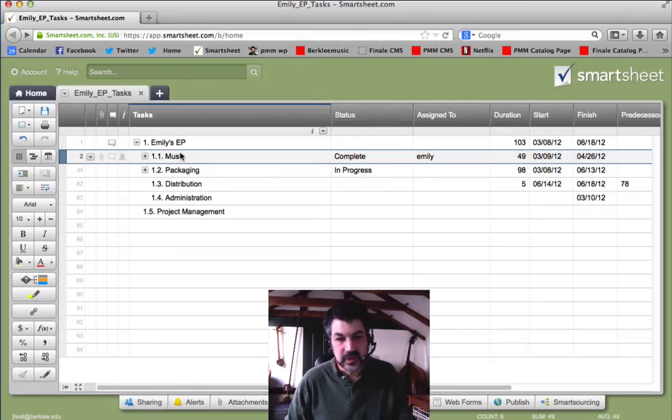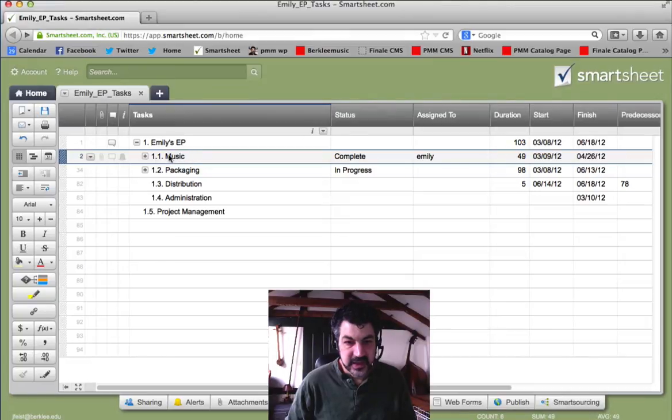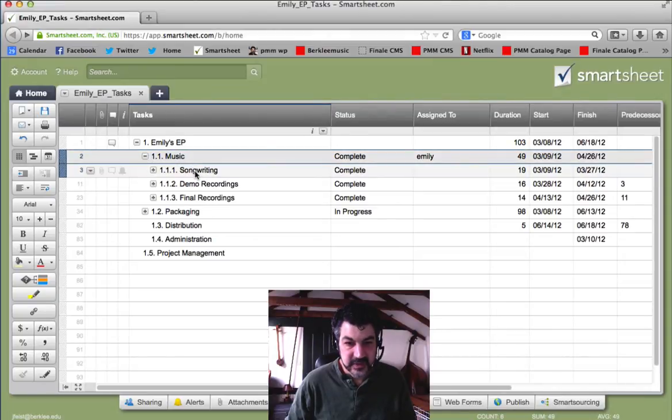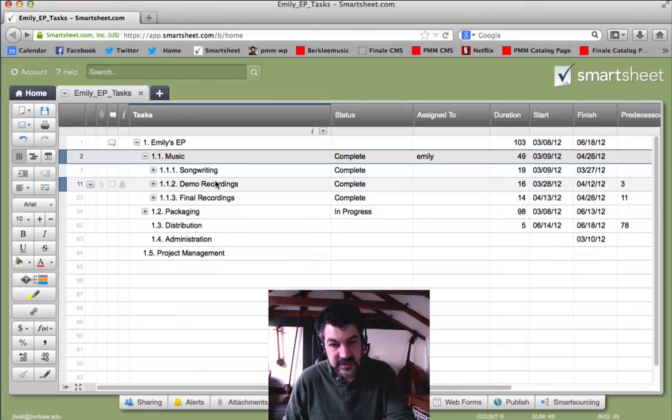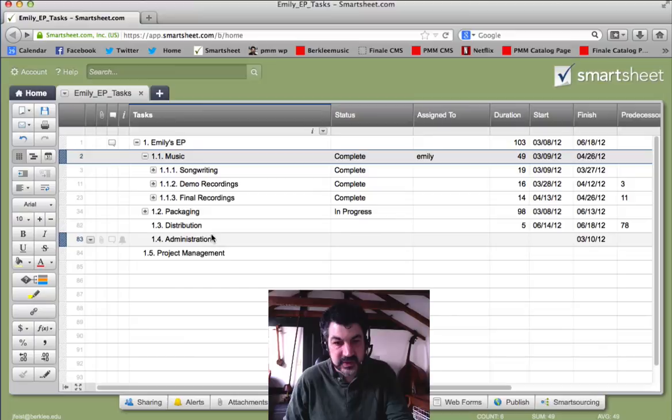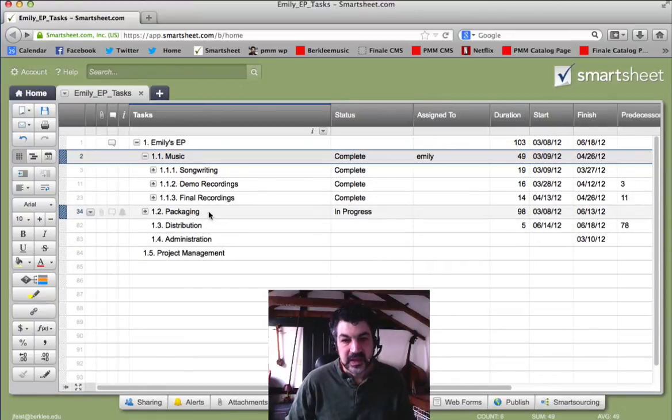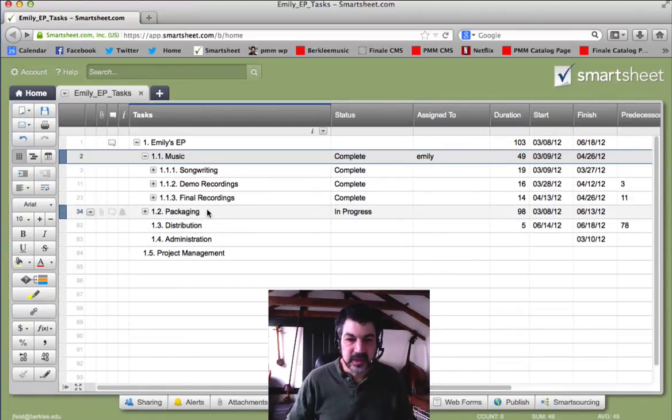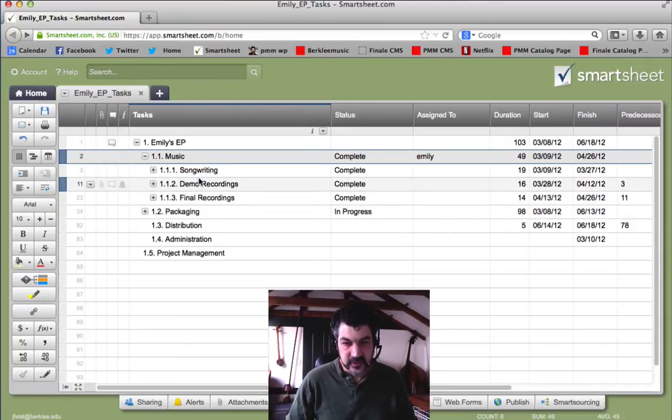For this recording project, we start out with the music, we start with songwriting, and then demo recordings and final recordings. First we do this, then we do this, then we do this, then we work on the packaging, roughly, then distribution. Administration kind of touches all of them. And so it's not exactly chronological, but it's roughly, and that helps to keep things relatively organized.